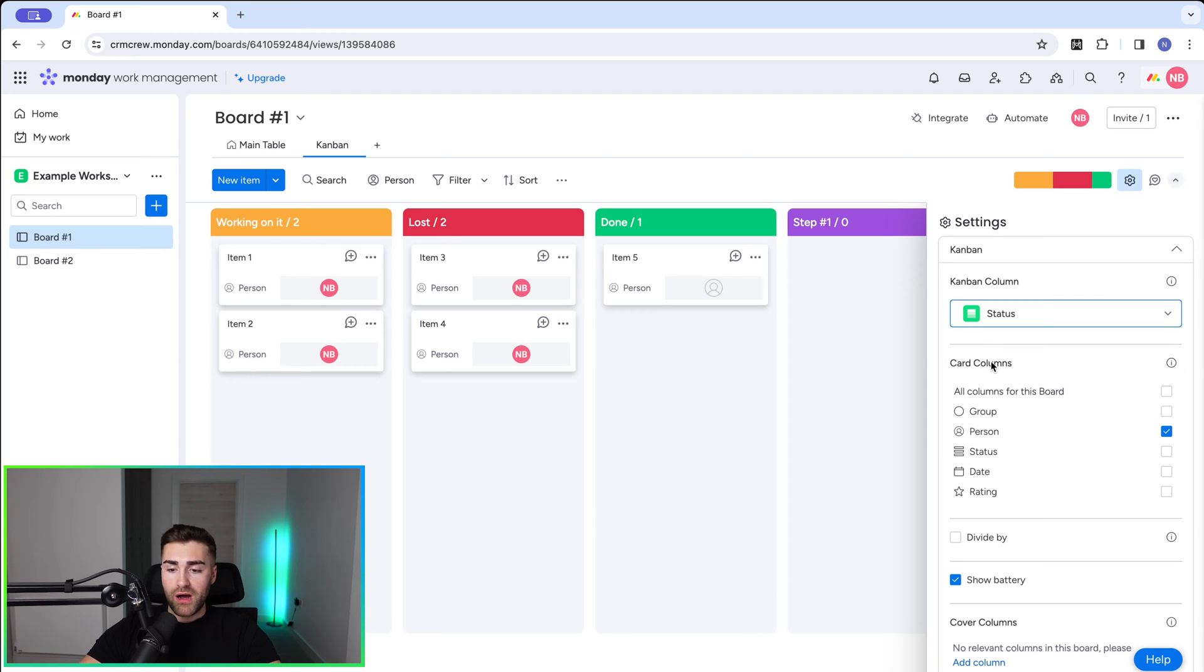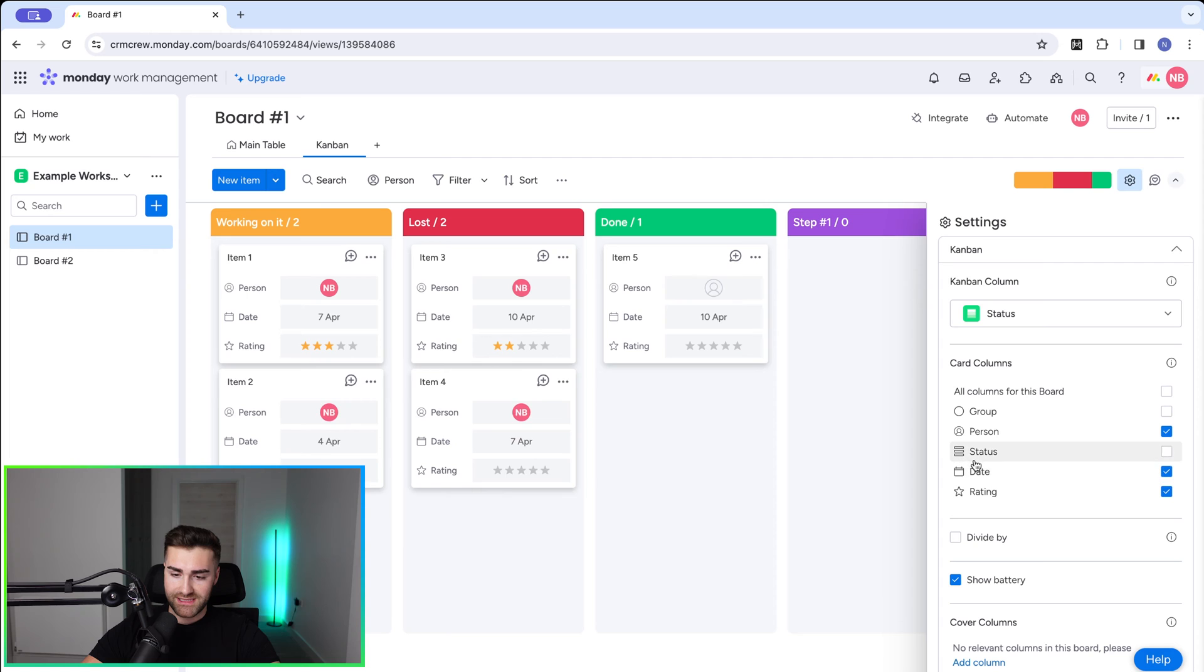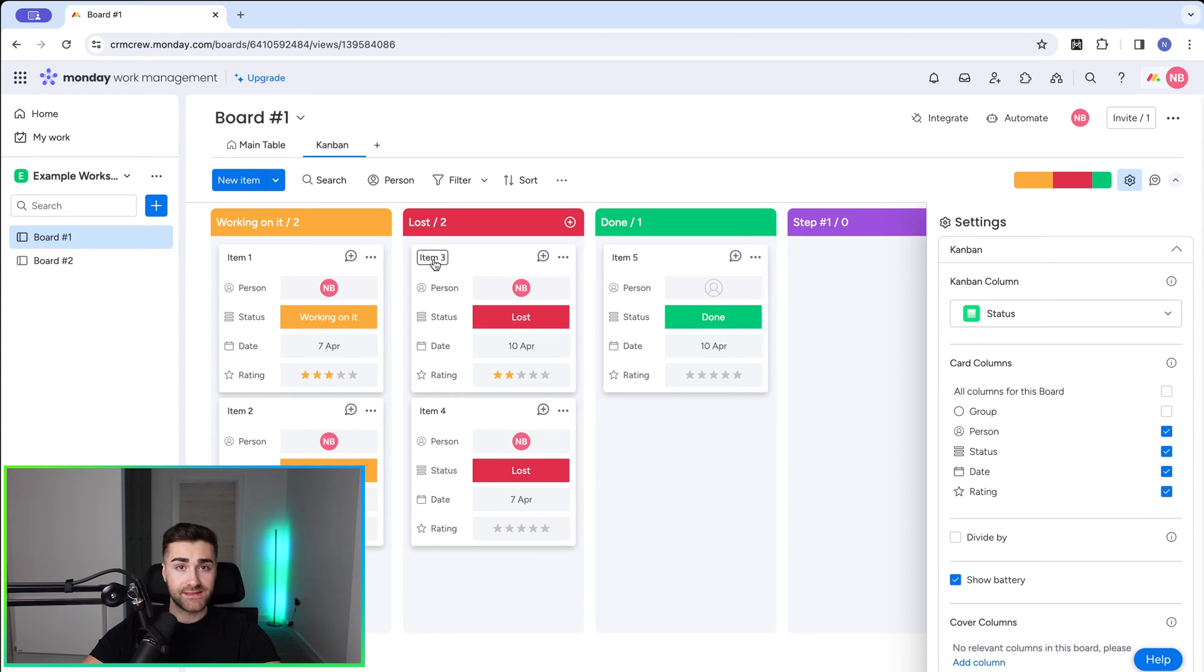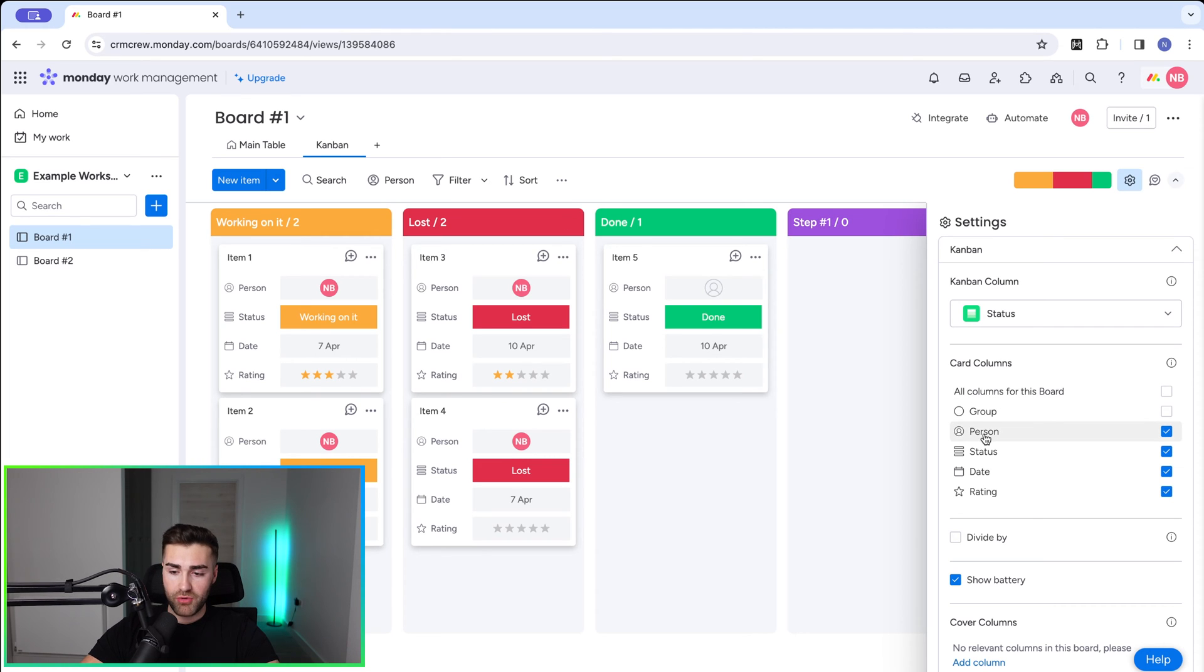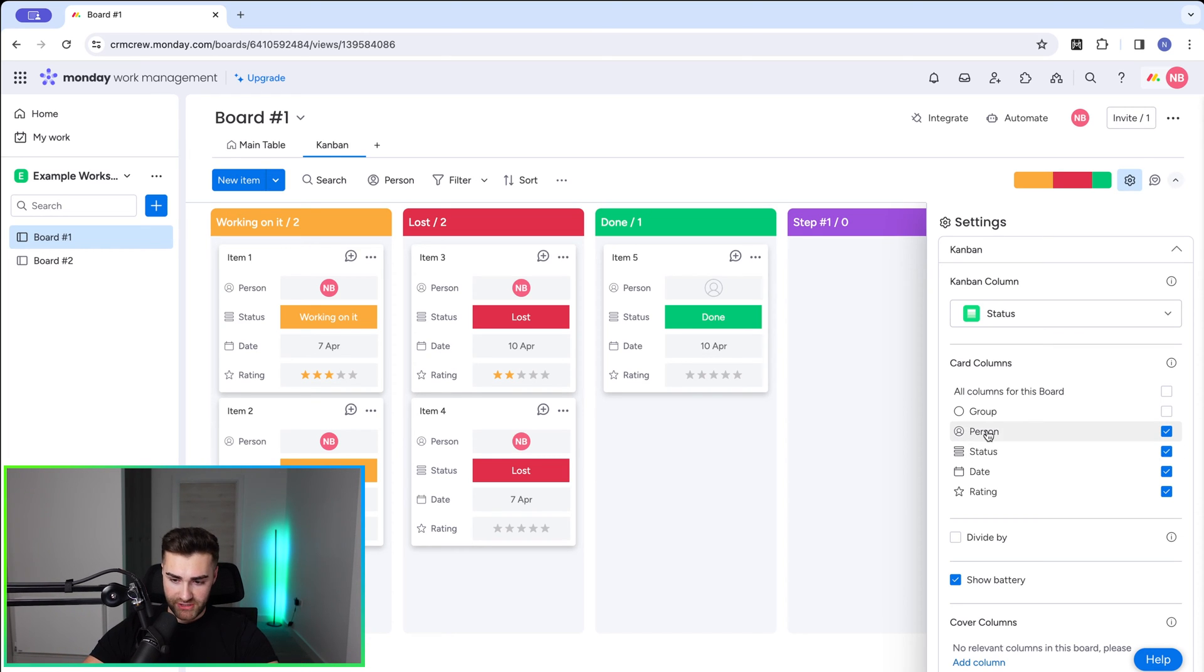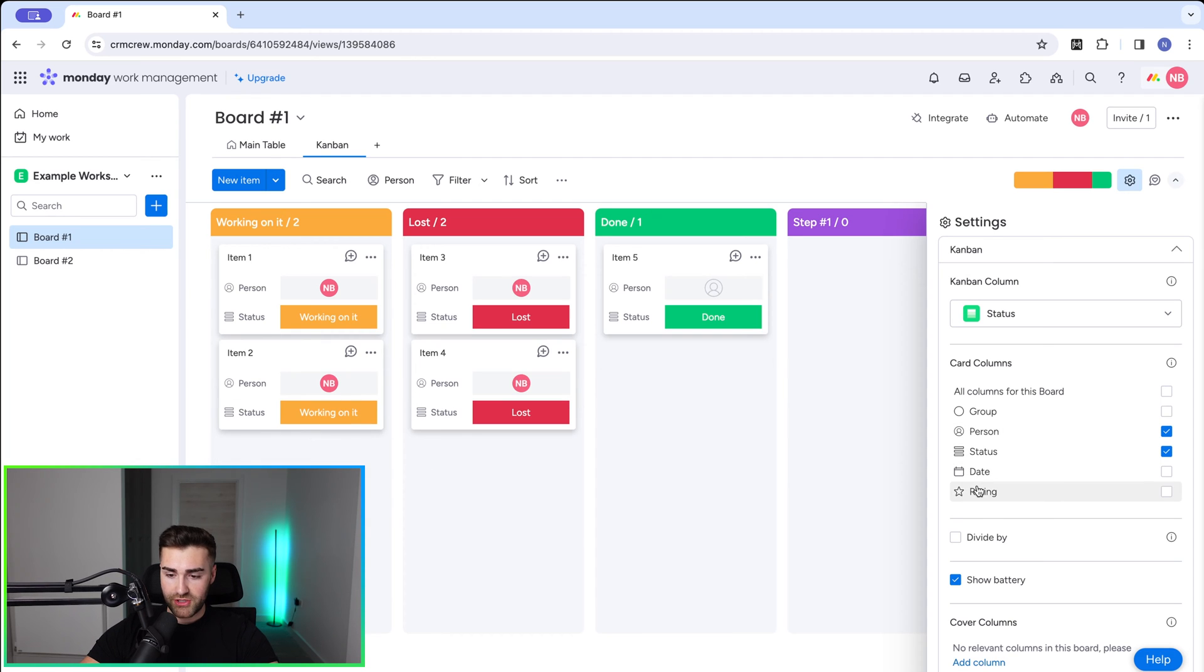Then moving on from there, we have our card columns. So this is the information that we can easily see from each of the cards. So if I select date, rating, status, that populates more information per card and it's easy to see what is going on at a glance. However, do bear in mind that obviously the more information and the more items on the Kanban view, the more populated and the busier it's going to get, so harder to manage as a result. So just keep the most important information available to you.